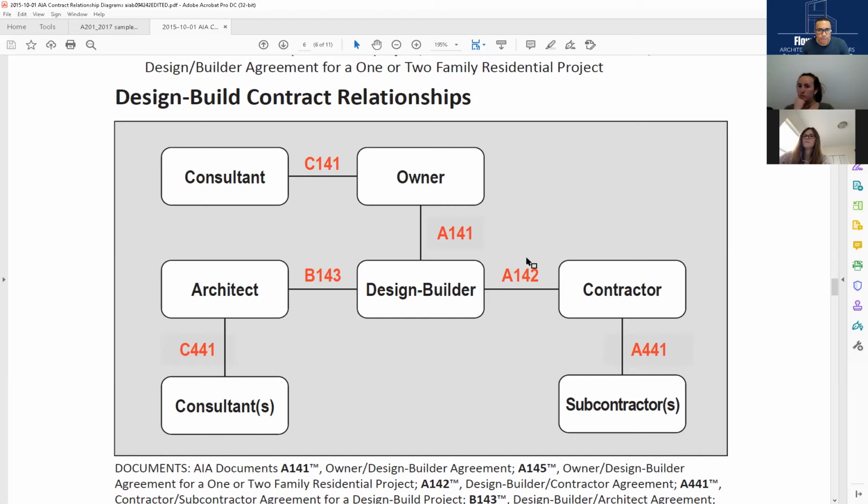Option A is we proceed as it is, no problem, no issue. It's gonna be a bouncy floor. Option two is we'll try to fix the bouncy floor by leveling it, but it's a change order and it's gonna cost $2,000. And I still would have said there may still be a chance that it will be bouncy within the floor because we didn't pour that concrete. We didn't do that existing then. So we can't get it perfect. It would be very expensive to get it perfect. It means pouring concrete all throughout the whole thing and leveling it all over because we don't know what the high points and low points are. We're just trying to patch the work right now. So that would have been the right thing to do.